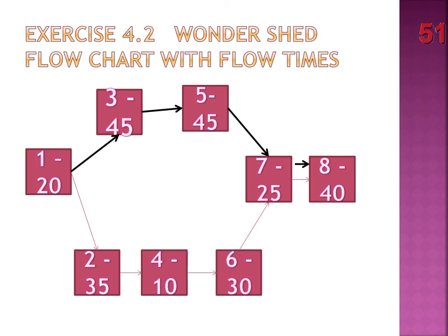And what's the impact on flow time of the process if the flow time of activity 3 is reduced to 40 minutes? So what would be the net impact? It'd be 5 minutes shorter. There you go. Yep. So again, do you see why I'm a little bit like, this is like the basic class, but if you don't make those connections, then you're not gonna track those through on your project. Okay. All right. And then let's reiterate, because it's going to be an exam question.